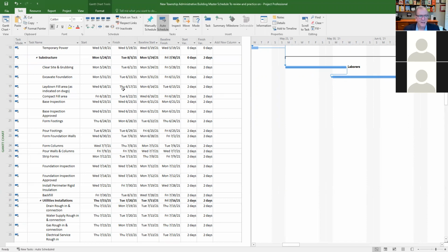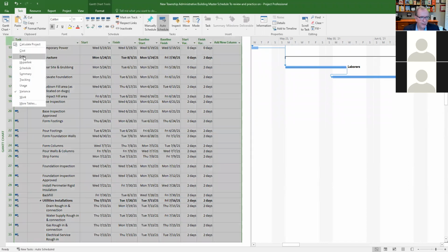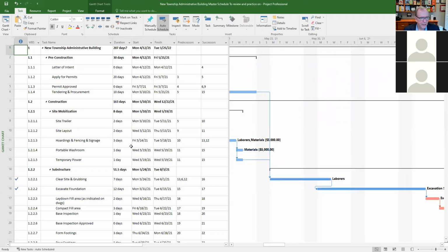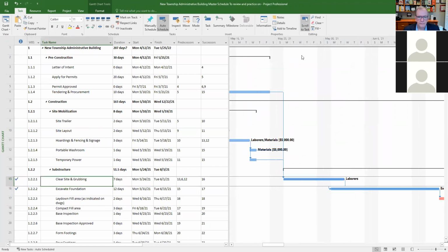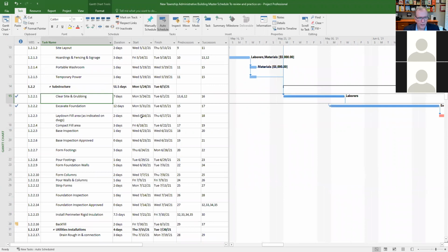So if I say, for example, if I go back here and I go here, right? If I zero this one out, watch what happens. So I'll zero this out. If I say this is 8 days, right? It's just going to push this. It's not going to push this because this is locked here because I said it's done on those dates. Yeah. It won't change those.